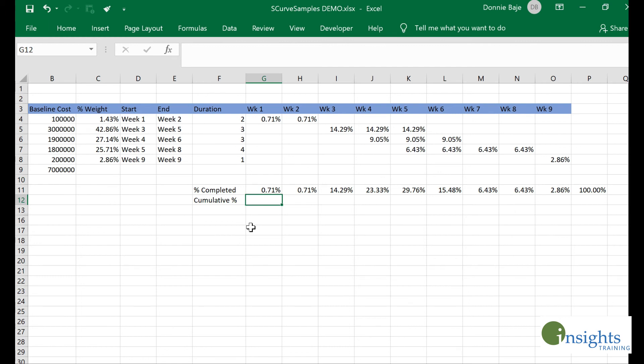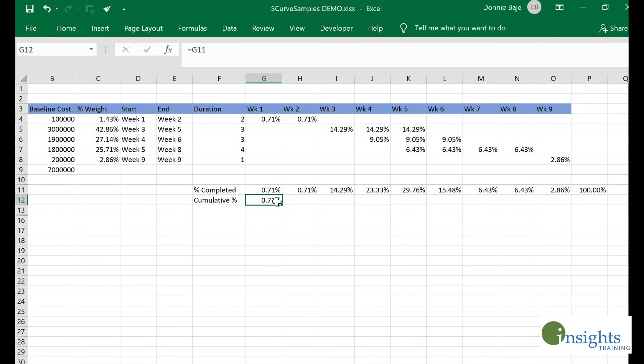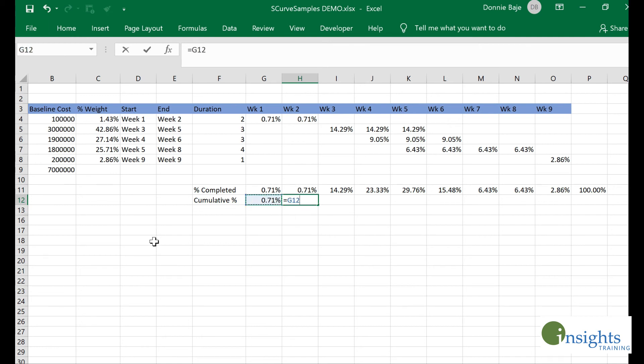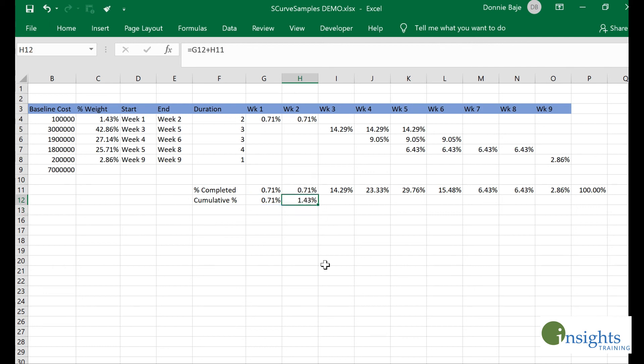Now finally, we will get the cumulative percentage. For the first one, we're just going to get the first amount. For the next week, we will get the previous percentage, add the percentage that will be used for that week, and then drag it until the last week.